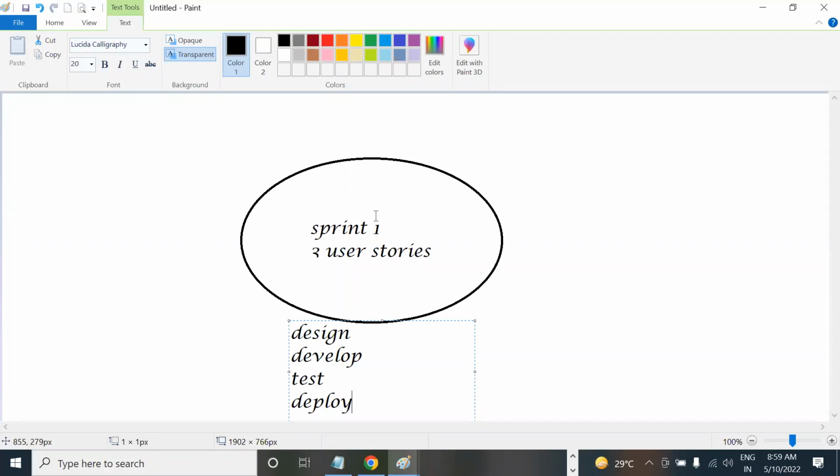If you are creating one user story, that user story will be completed in that sprint section only. Everything will be completed. Deployment also will be done. In the waterfall model, everything will be done and at last you will deploy it. But if you are going with agile methodology and you are performing 3 tasks, you need to deploy those 3 tasks. After that only you will go to the 4th task. This is how things go on in agile methodology. Any doubts, clear?